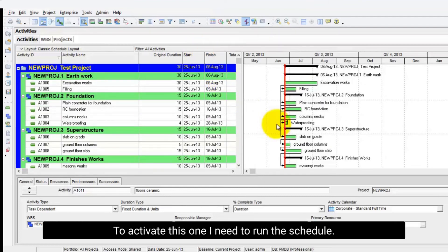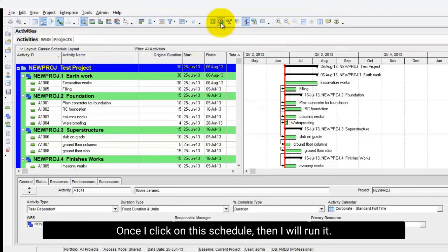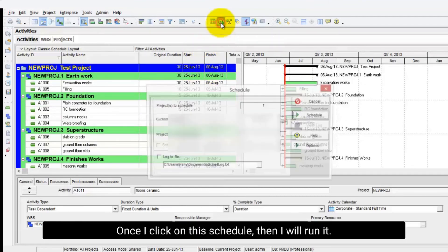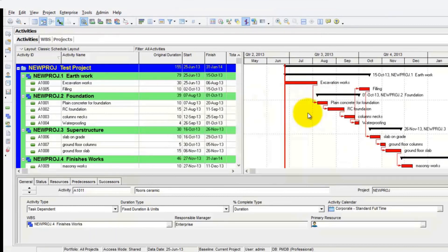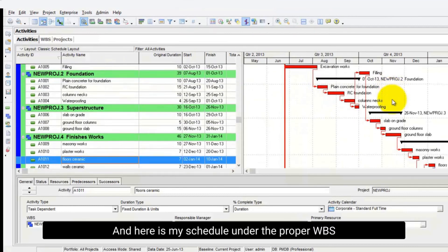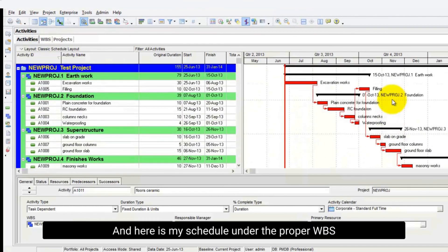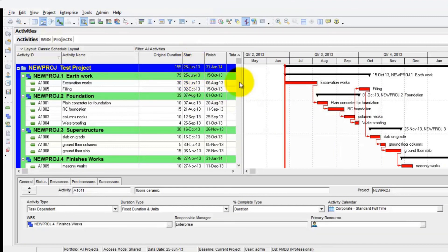To activate this, I need to run the schedule. Once I click on Schedule and run it, here is my schedule organized under the proper WBS.